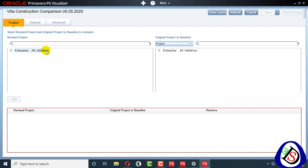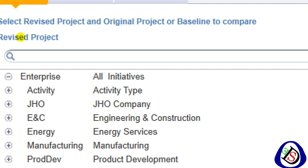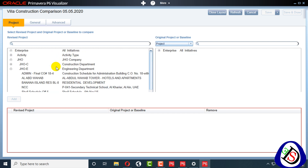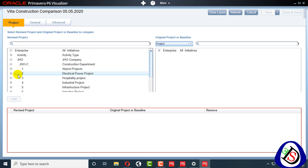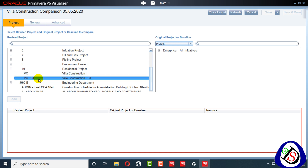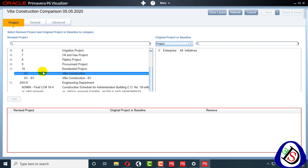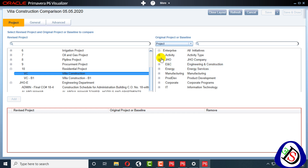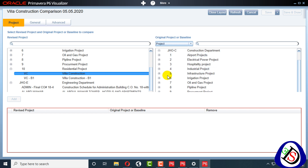In this window you can see you have to assign a project — it is labelled as the Revised project. I will go for the Villa Construction residential project. Here you can see Villa Construction — this is my updated version. B1 is my baseline, so I will add the updated one. Then for the baseline I can directly assign project baseline or assign a project here. I'll add the same Villa Construction residential project.